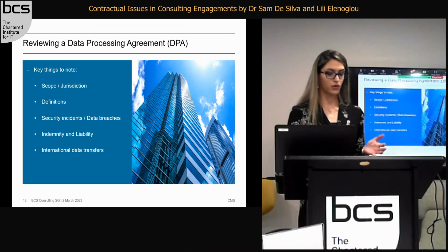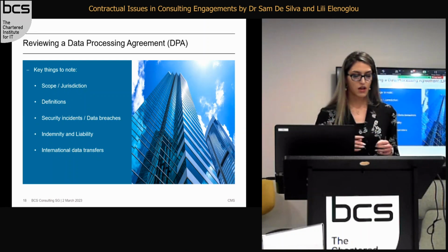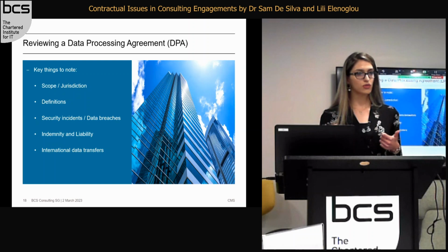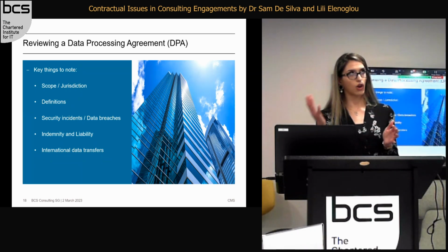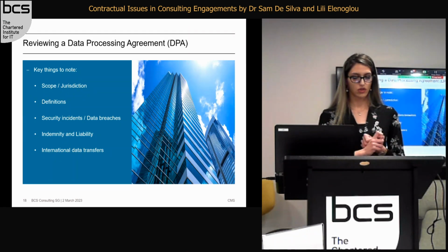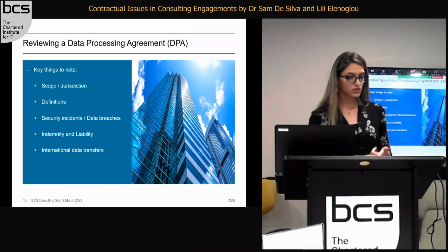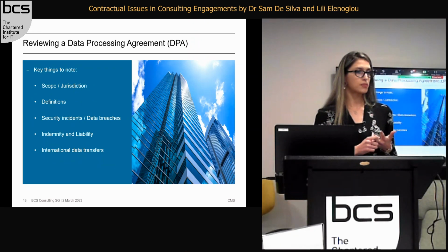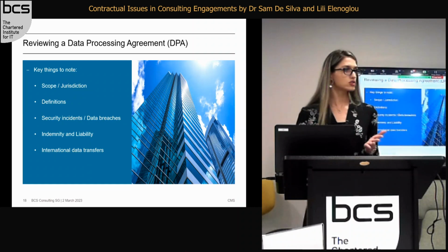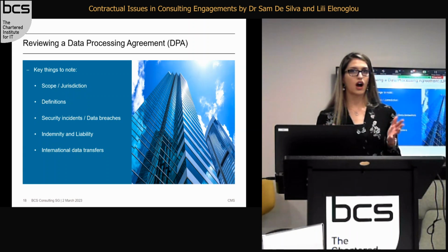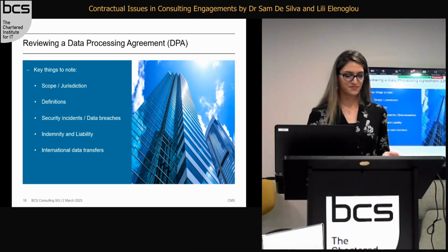So what do you need to be mindful of when negotiating data protection, indemnity, and liability? Step one, identify any actual risks from data processing. And second, think about what the consequences of the risk are generally, and possible costs and losses. So this could be statutory compensation claims from data subjects, complaints from individuals, maybe any monetary penalties from regulators, reputational damage and adverse publicity, loss, misuse, and corruption of personal data. So anything that can harm them and they want it to be covered, they are trying to put there. But yeah, don't agree generally to unlimited liability, probably the very wise option.